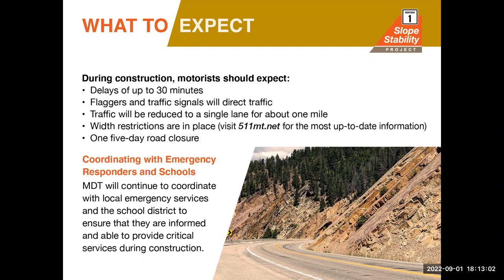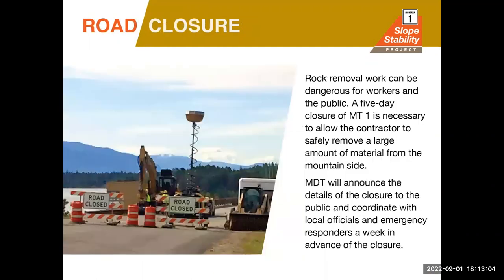Now can we switch the slide? We'll talk about the specific road closure. MDT and the contractor will try to minimize the inconvenience to the traveling public during construction. Work to remove rock materials from the sides of the mountain can be dangerous for workers and the public. A 5-day closure of the road is necessary day and night to allow the contractor to safely remove materials. The public will be notified about this closure well in advance of any planned closures. Brandon will talk a little bit more about those notifications later.